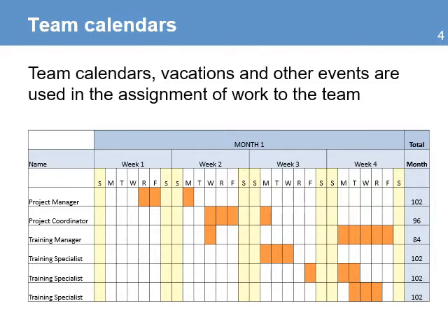Another good use of this team calendar is that it helps you make sure that not all your team will be taking vacations or time off at the same time or during a critical time in the project. If there are problems, you can negotiate with the team to reschedule their vacation or time off days to make sure that they are not missing the whole team during a critical moment.